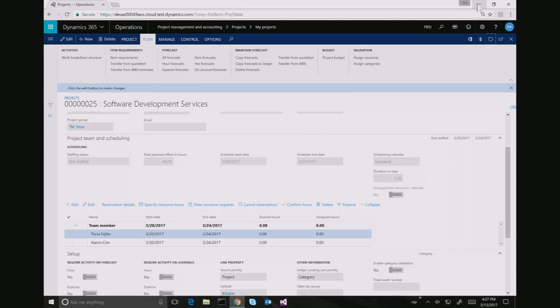Sorry, you didn't set up any price for Aaron. Aaron, yeah. Would that be a problem? That will be a problem, yeah. Not yet, of course, because he hasn't done any work yet. But as soon as Aaron reports time, if I don't have a price, I will have a problem. So there's no warning beforehand? Right, because I could do it at this point, right? As long as I do it before he reports time, I'll be good. Yeah. The problem will come one day. No, you're right.